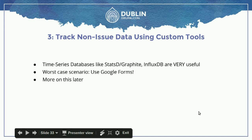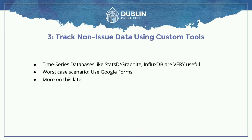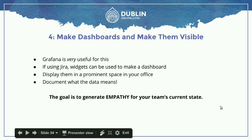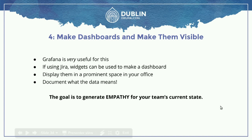Step three. So you've got your ticketing system, you're tracking your time. The third thing you can do is track non-issue data using custom tools. There are time series databases like statsd/Graphite and also InfluxDB for those into that — they're really useful. You can write code or basic utilities and tools to emit metrics into these systems for graphing. And in the worst-case scenario, you can use Google Forms. Now you've got all your data — your ticket data and your non-issue-tracker-related data — and you can make a dashboard out of them.